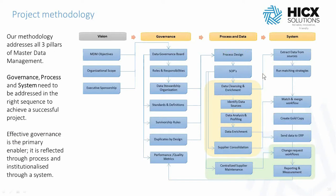In terms of project methodology, taking this one step further, what are the things you really need to think about? This is sequential, and there's a reason why you do certain things before other things. Step one is to have the vision of where you want to end up, and a key part of that, as Jerry said, is that you need executive sponsorship. This is going to be a business transformation project, not an IT project, and you will need people backing this from the top in order to facilitate alignment further down. Once you have that, we need to work first on governance, and that typically means first defining the data governance board.